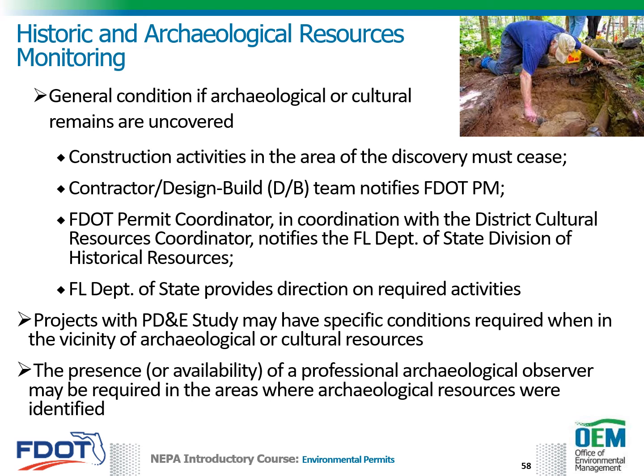For projects where the PD&E study identified the presence of archaeological or historic resources, the state ERP and/or the Corps or state dredge and fill permit may also contain a set of specific conditions. These conditions identify any actions that FDOT is required to perform when constructing in the vicinity of an archaeological or cultural resources. If a PD&E study was not performed, any archaeological or historic resources present in the project corridor will be identified during the permit application process.